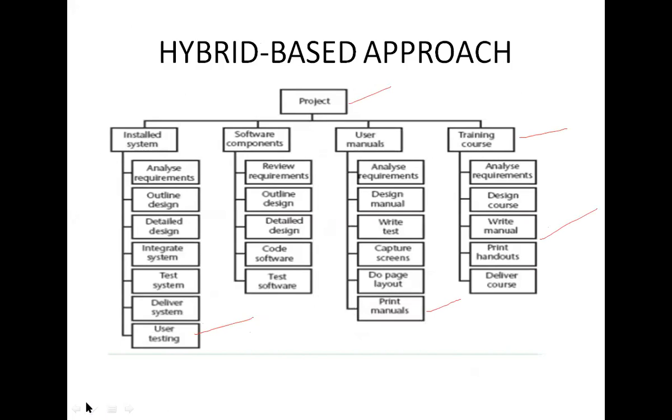In level 1, we start the project. In level 2, we have deliverables such as software, manuals, and training courses, or user manuals. All these are performed in level 2. Level 3 has components, which are the key items to produce the deliverables, such as modules and tests required to produce the system software.